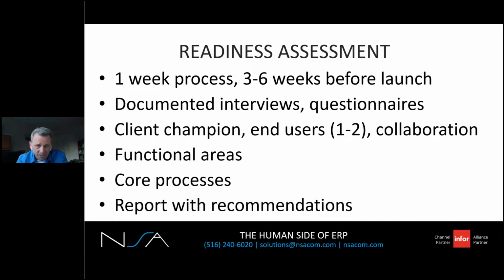So, readiness assessment. Best practices for the RA, or readiness assessment, is to have it done by a consultant, or one of the consultants, who was not previously involved in the project. So the same company, but just not the lead consultant on your project. The RA is done after the end user training. Typically, the RA will require 1 week to perform, and is typically done 3 to 6 weeks before launch, so you have time to address any weaknesses.